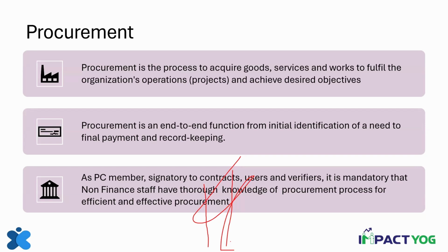So for instance, you have procurement of nets. If you have nets procurement, the record keeping will be in terms of receipt, verification, approval, payment, and record keeping. It means that inventory was included in our inventory records and then issued from the inventory records to you for distribution, and you will finally give some kind of proof that those particular nets were given to the beneficiaries, by giving a receipt to them, which will ensure that the inventory has been finally consumed. So that's the spectrum of procurement that one has to understand.